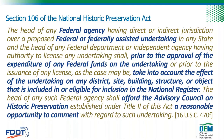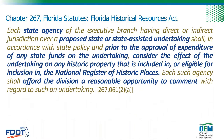There is a lot of text on the next two slides but I want to focus on a few important bolded points. This is the text from Section 106 of the National Historic Preservation Act — the federal law. Section 106 requires federal agencies to take into account the effects of their federal undertakings on historic properties prior to the expenditure of federal funds. Section 106 also requires federal agencies to give the Advisory Council on Historic Preservation, or ACHP, a reasonable opportunity to comment on the undertaking and its effects.